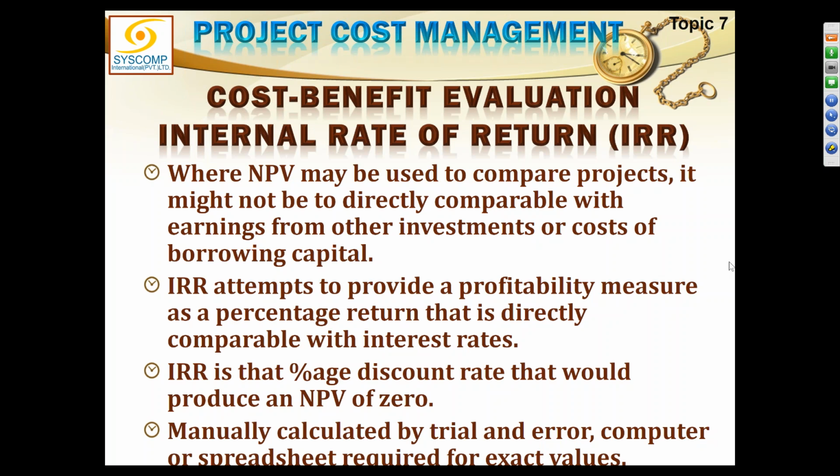6.7531, where my NPV becomes exactly zero. So this 6.7531 is my IRR. And every project I am analyzing will have a different value for IRR. This project is 6.7531. The other project is 3.2131. Another project is something else.